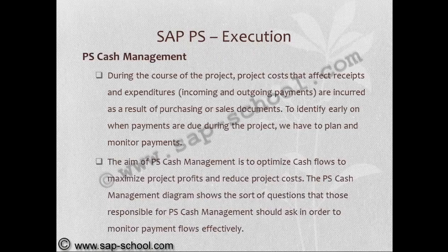Project system cash management. During the course of the project, project costs that affect receipts and expenditures, that means incoming and outgoing payments, are incurred as a result of purchasing or sales documents. To identify early on when payments are due during the project, we have to plan and monitor payments. The aim of project system cash management is to optimize cash flows to maximize project profits and reduce project costs. The project system cash management diagram shows the sort of questions that those responsible for project cash management should ask in order to monitor payment flows effectively.